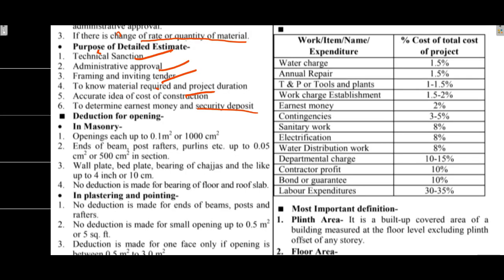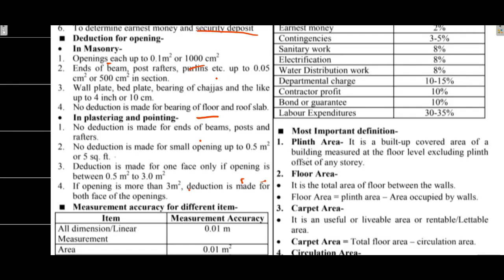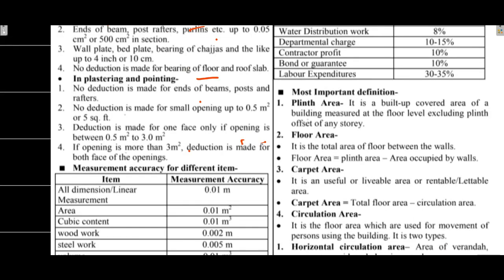For deductions, openings up to 0.1 meter square or 1000 cm square, no deduction is made for bearing of the floor and roof. In plastering and pointing, no deduction is made for ends of beams, posts and rafters. No deduction is made for small openings up to 0.5 meter square.